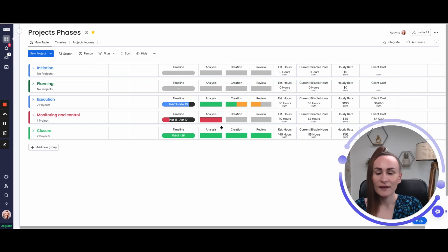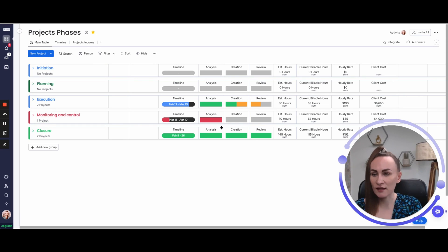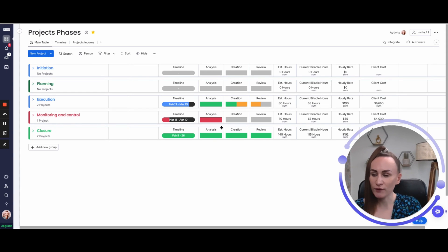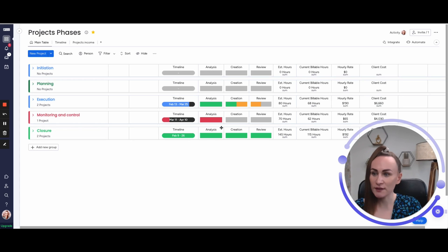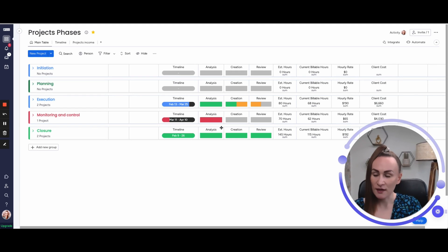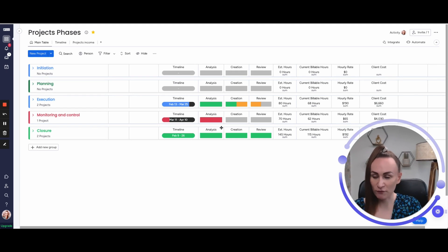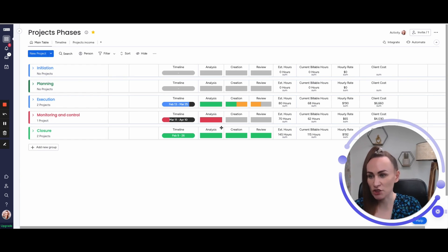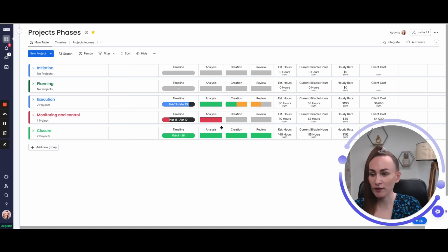There are departments where project has phases and teams have culture working on those phases. One way to use groups on the project board is to actually use the names of your project phases. This board provides just one example of five most commonly used project phases: Initiation, planning, execution, monitoring and control, and closure.